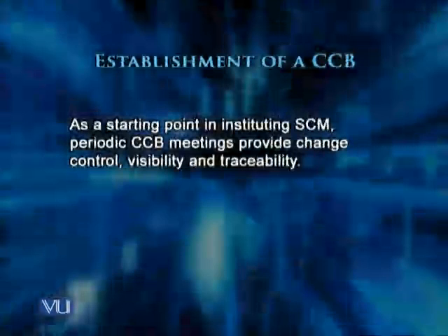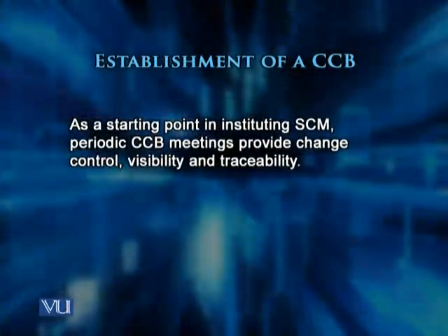Let us now move on to another consideration in SCM, and that is establishment of a CCB. We had some discussion on this in the last lecture, but we need to have more discussion on this. As a starting point in instituting a software configuration management program in an organization, periodic CCB meetings provide change control, visibility, and traceability aspects within the project.